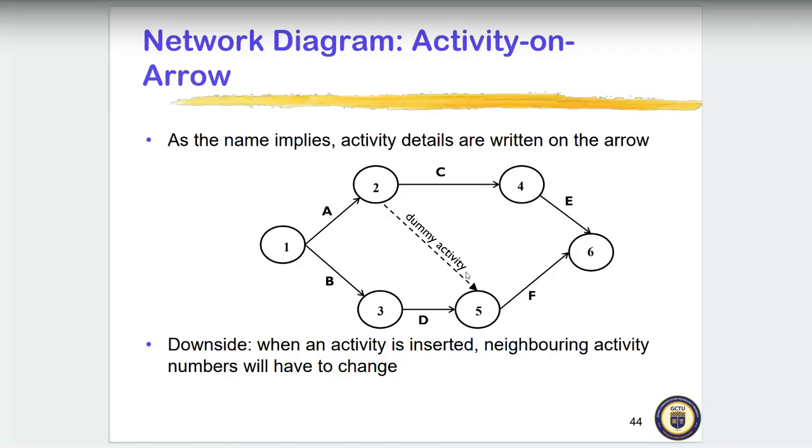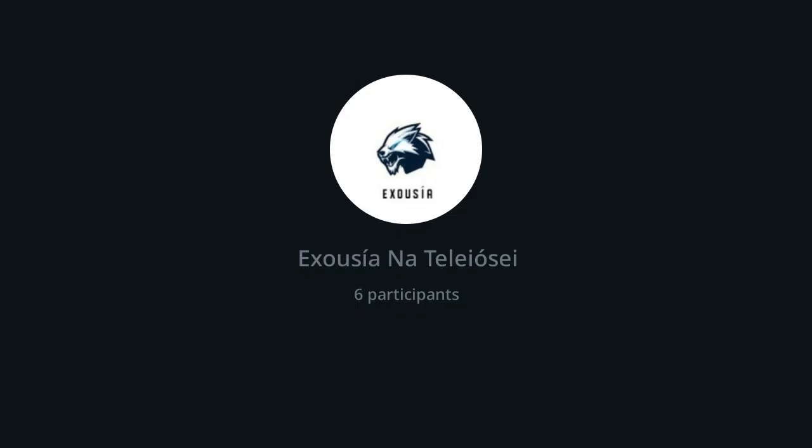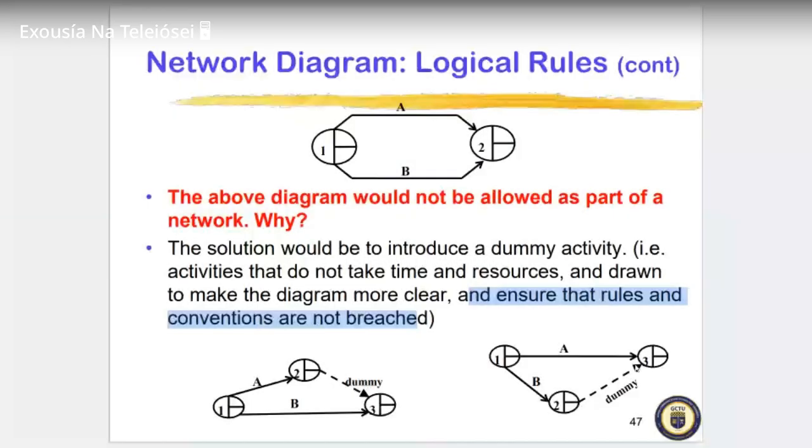A was supposed to be connected to maybe D. That is event 5. Okay, to D right there. But because we don't want to violate this particular one, we left it out. So we just made a dummy activity. Yes, so we can also do it this way. You can either make A B, and then we make B a dummy activity, right here.